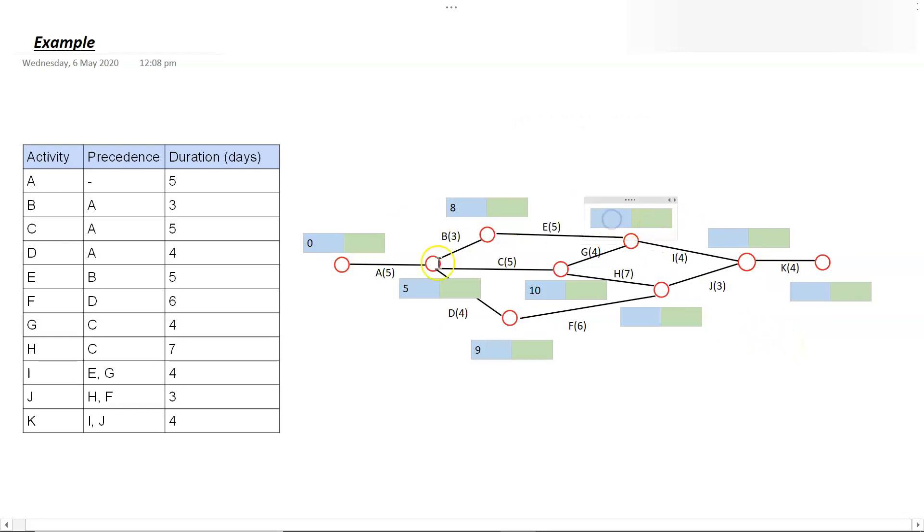So for example, with this one, if we were to follow this through, we have five plus three is eight plus five, would be 13. And if we follow this one through, we'd have five plus five plus four, which is 14. So we won't use 13, we'll use 14 there for this node.